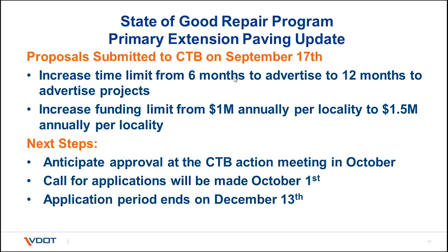I will say that the locally administered projects manual will need to be followed for federally funded projects. So you just want to take a look at that and make sure that you're adhering to all of the required documentation information. But we will clarify whether or not the public involvement process is required. And I think there's an exception for paving that does not require any right-of-way.